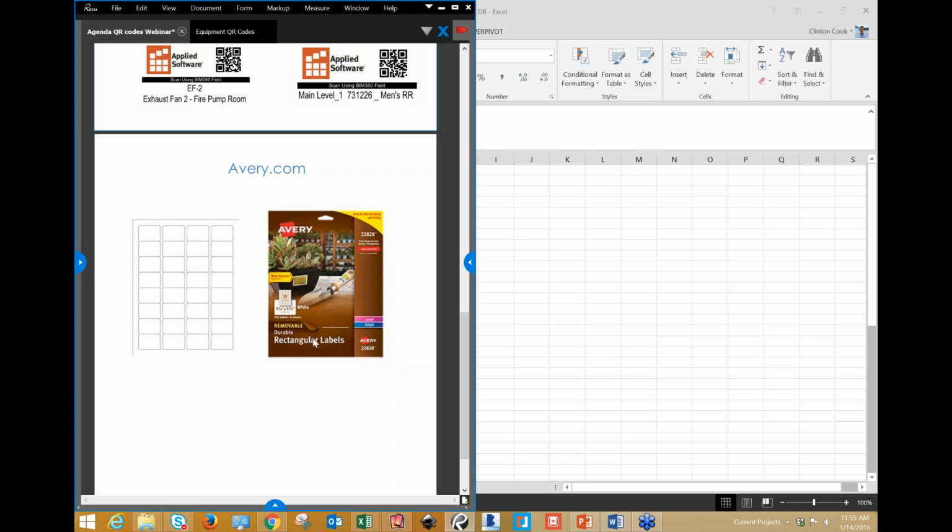Just because you'll be able to have a lot more options in your labels. You can get vinyl labels that won't be affected by the rain or the sun, but it is going to be a little bit of an investment of money. The last time we priced it, it was somewhere between, I think, $1,500 and $2,000, and that included a dedicated printer, a pack of labels, the resin that goes with that, and the software to print to those printers. So it is a little bit of an investment, but this is a great way to get started, learn how to do it for little or nothing.